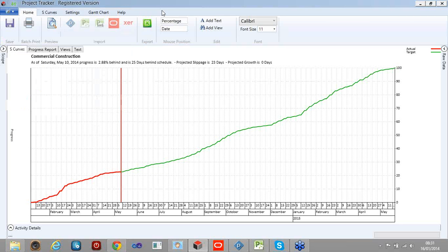There's some fairly clever work goes on in calculating the curve, in that it's unlikely to happen in Primavera, but can happen in Microsoft Project and ASTA, that there could be uncompleted work prior to the data date because the user hasn't rescheduled or recalculated the project. So what I do there, I calculate the amount of uncompleted work that's been done and spread it over the remaining period to make sure that the curve meets at the correct point, which you can't do in Excel.